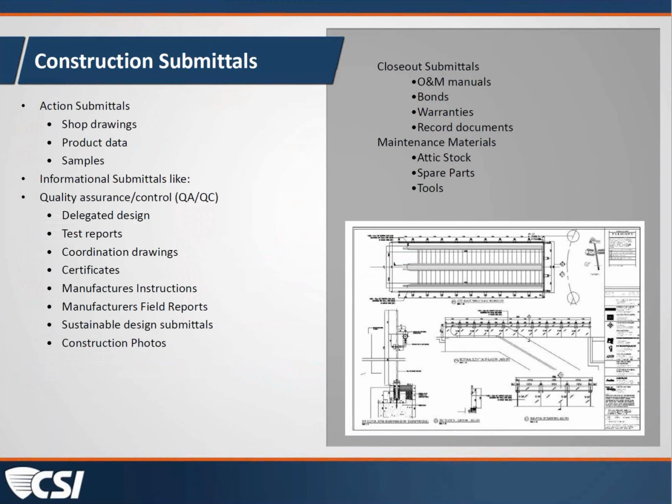So, you know, we often receive pieces and parts of these various tools that habitually get filed away and maybe not used. I'll touch on one and then be quiet and let Doug respond to others. But for example, any kind of insurance or bond that you have on the project is an important document to look at. If for nothing else, there are renewal dates that are required to keep those in place.